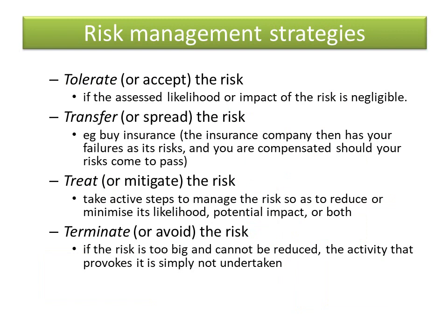So we've got the 4 T's here of risk management: tolerate, accept it; transfer, such as insurance; treat it, which means reduce it through reducing the impact or reducing the probability or both; or terminate the risk, avoid it. So they're the 4 high level risk strategies, and these apply equally to the supply.